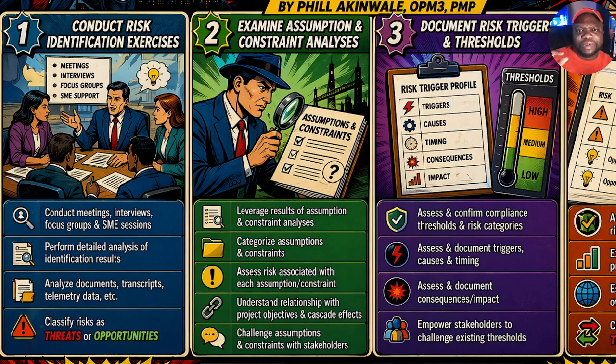For example, a risk of someone falling over. What could cause that risk to happen? A wet floor or a mop bucket. See, two ways to think. First of all, find the risk. What could cause the risk? Wet floor, right? That could cause the person to fall down. And what will the effect be? Broken bones or even a lawsuit. You see, you got to think broadly.